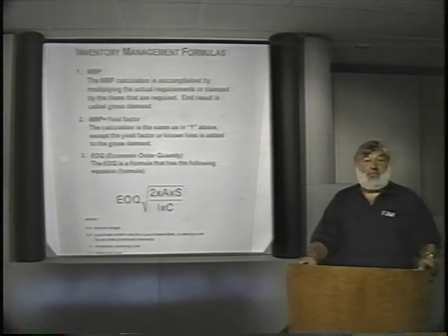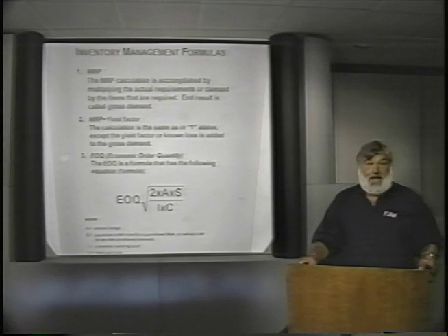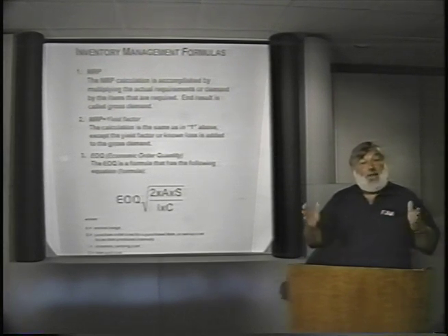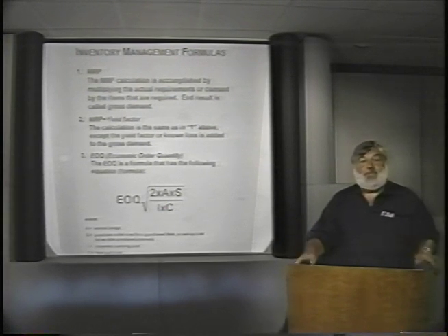The supplier supplies 3-inch aluminum tubing or piping in 10-foot lengths. That means I'm going to have to purchase 100 feet. That is 10 pieces. Immediately I know that I'm going to have a 5-foot yield, or what we call a cropping, or some people call it a fall off.